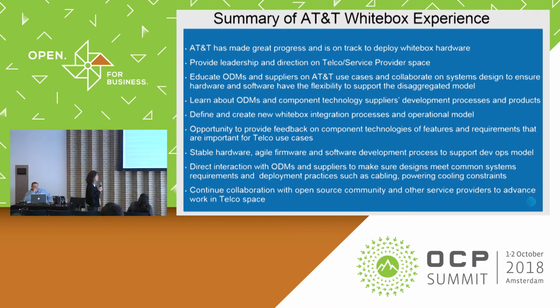Is there a concept of NEBS compliance? Yes. So one thing that we did there is an example where a common requirement makes a lot of sense, because once you do it for a class of hardware, it is the same requirement. If it's indoor, if it's for central office, you only have to write it once, and educate the ODM suppliers, or go over it with them, once. Previously, the supplier would just go off and build to the requirement, and sometimes they guess what you need, and then later on it does not pass. You have to go back and put in some filter to make sure that it passes EMI or EMC, and so on. That's not the most effective way of doing a design.